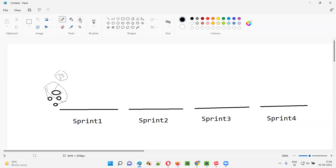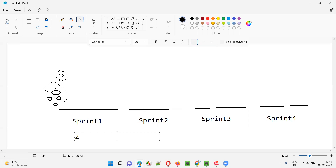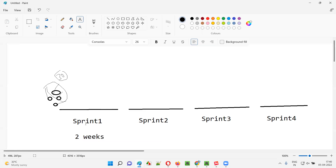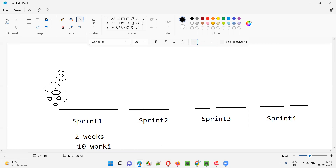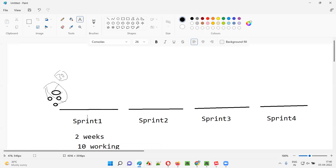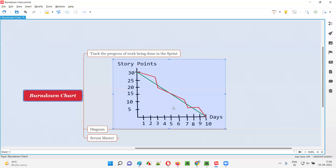The duration of a sprint is generally one to four weeks. For this example, assume the sprint duration is two weeks, which is 10 working days. On the horizontal axis we write down those 10 working days — first day, second day, third day, fourth day, fifth day, and so on till day 10.